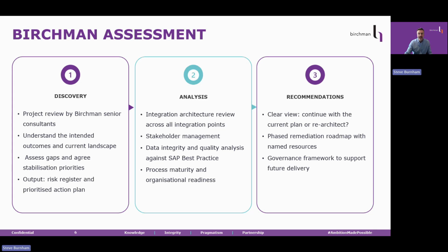The output of this phase is a risk register and prioritized action plan. This is a working document, not a report to file. It's what gives the sequencing of the analysis phase and provides the framework for the recommendations. Clients often find that the discovery week alone surfaces things that have been obscured by internal politics or the program team's desire to project confidence.